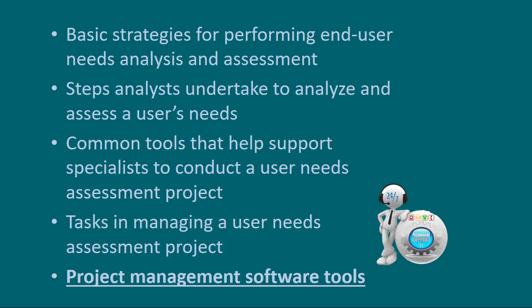When you're implementing a new system, you need to look at different ways of implementing. There's different strategies that are involved. You could do a direct conversion. This is where you terminate that existing technology when your new solution becomes operational. This is risky, and some people do it. It's probably not best practice because of the fallouts that can occur.